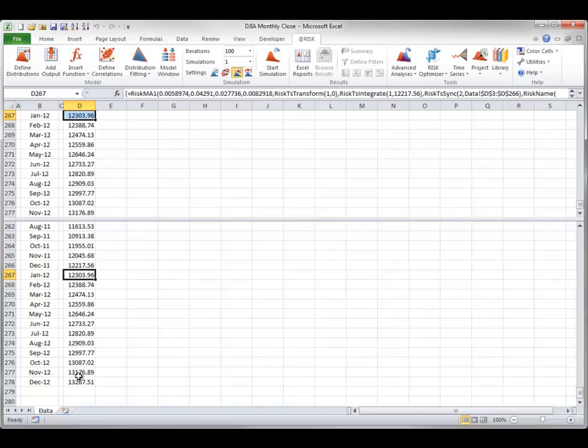As usual with @RISK distributions, static values appear in the range unless you toggle the @RISK dice button to random. Then they jump around. These future forecasts can now be used as inputs to an @RISK simulation, just like any other input distributions are used.